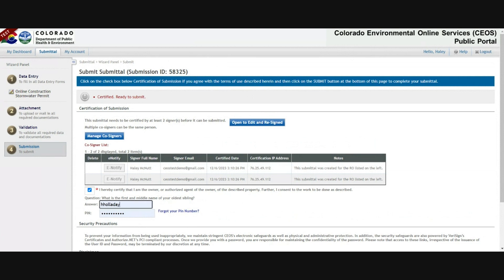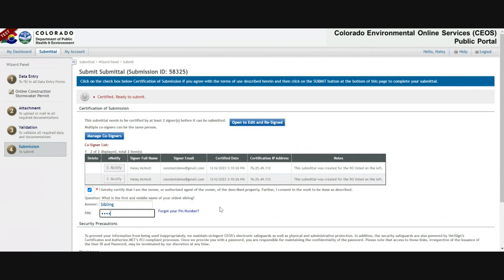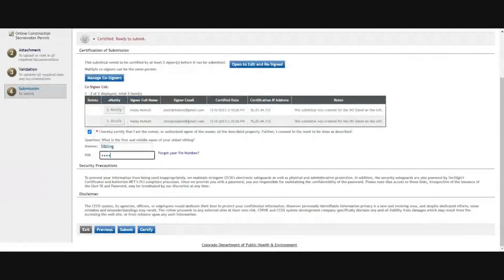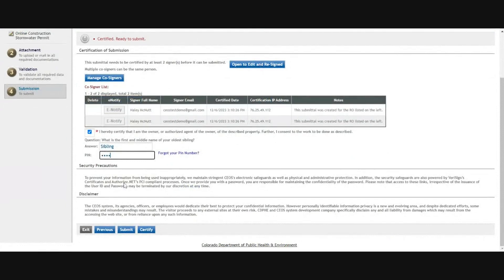Once you've certified, you're ready to submit, which is the same exact step. Use the checkbox, enter your question answer and the PIN. But make sure both the owner and the operator have certified before you submit. Once all of that's entered, click submit.